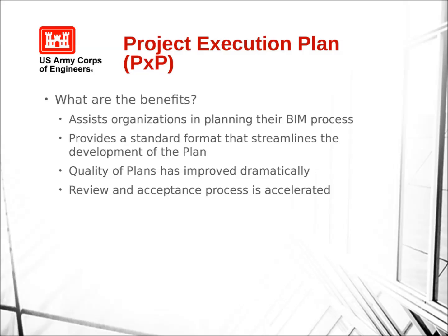And what the PXP does is essentially show which BIM uses or SIM uses are required for that particular project. So what are some of the benefits of being very clear with the BIM uses that you expect up front? Typically when I'm talking about BIM uses, I'm talking about design authoring or using BIM for progress reviews, interference management or clash detection. These are all very common, but in some cases you also might be looking at coordinated views during the construction. Also, are we talking about record modeling? All those I have mentioned are required, and there are other optional ones beyond that.